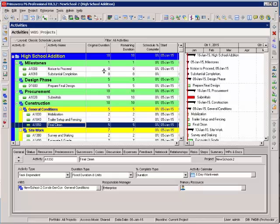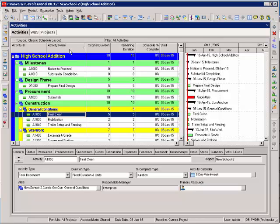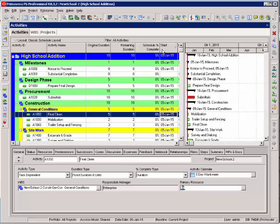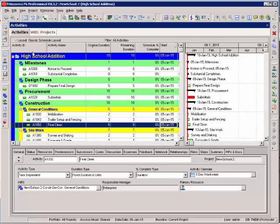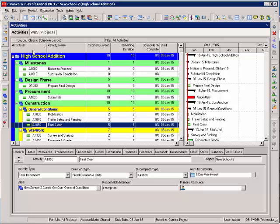Let me give you a tip as you're entering your activities. Sometimes you'll enter activities and you'll notice that they're jumping out of order. This can be affected by what column your table is set to sort by. For example, if I have the activity name selected or the start date selected, it will sort by that column. If you want to keep them in the order as you're entering them, select the activity ID since your ID is being automatically generated to develop numerically.